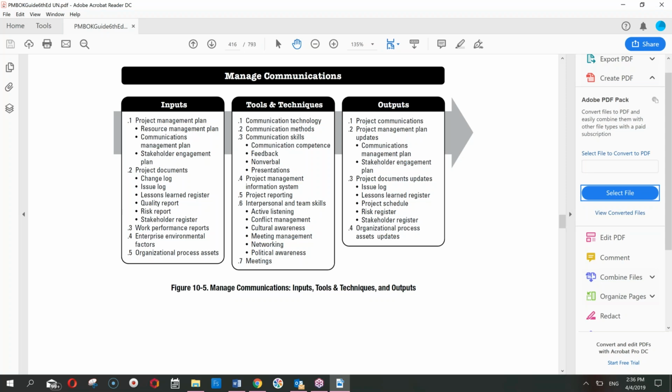You will keep track of all the communications, ensure that whomsoever is the source releases that information at that specific time, and whomsoever is the target of receiving that information has received it. You can even issue reminders before that activity has to start, and that is a very good way of ensuring some communication.